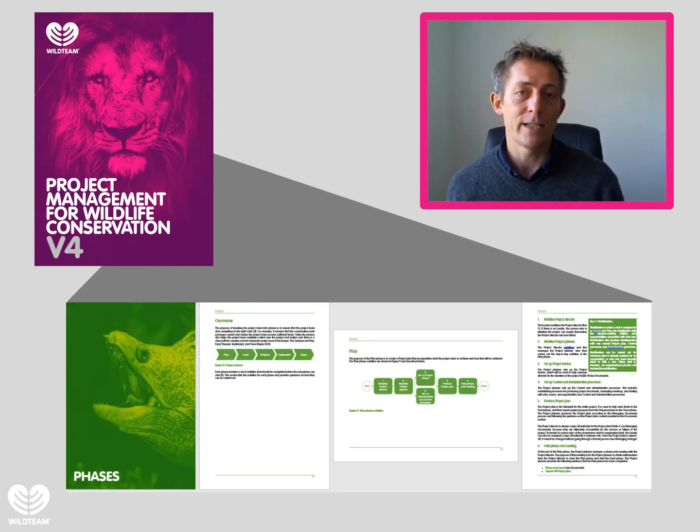So the phases section tells you how to break down and manage a conservation project from start to finish. The first phase is plan, where you make your project plan, what impact you want to make, how you're going to make that impact, how much it costs, what the team looks like. Then you move on to the second phase, which is fund. So you raise enough funds for you to then continue with that project.